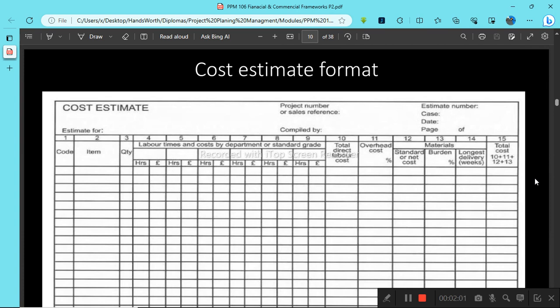And one of the ways we can make those estimates is by making a comparison of a similar project that has been conducted, similar to our project. And then from there we can derive total estimations.